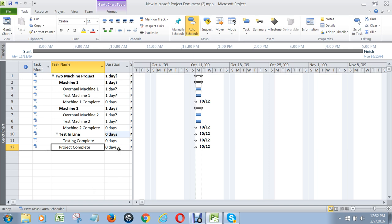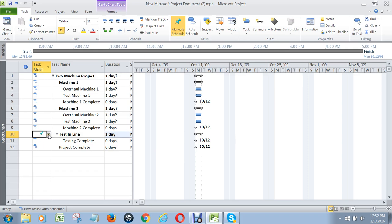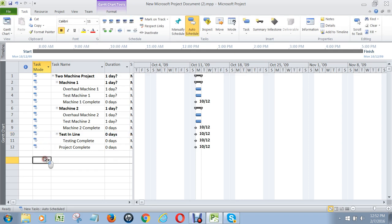One thing — I made that a milestone; it should be at its default of one day. And notice this: this is another common mistake. For some reason when we made that change, this became a manually scheduled task. Be on your lookout for those and change them to auto-scheduled if they come up. You should never have any green icons in here — they should always look like this.